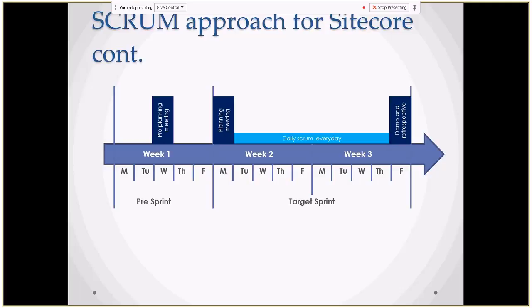When we are doing this, all these user stories are in the requirement management system, which is RTC now. So anyone in the delivery team can go there and see the requirements prior to joining the planning meeting. So with the test cases, they will have a clear idea what this requirement is. When it comes to the planning meeting, they can provide a better estimate. That means in the pre-planning stage, the development team is analyzing, reading and understanding the requirements, not in the meeting itself, but within these days they will be going through the requirements.